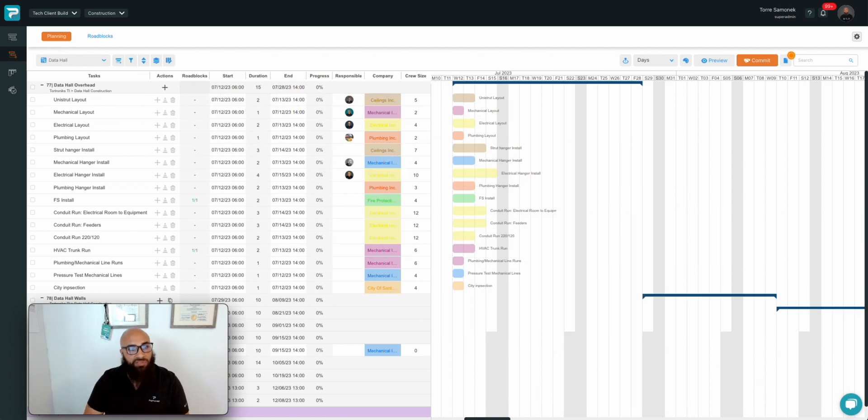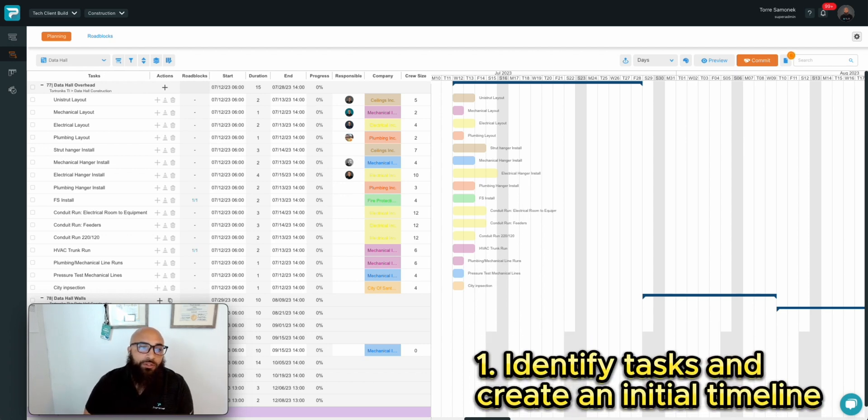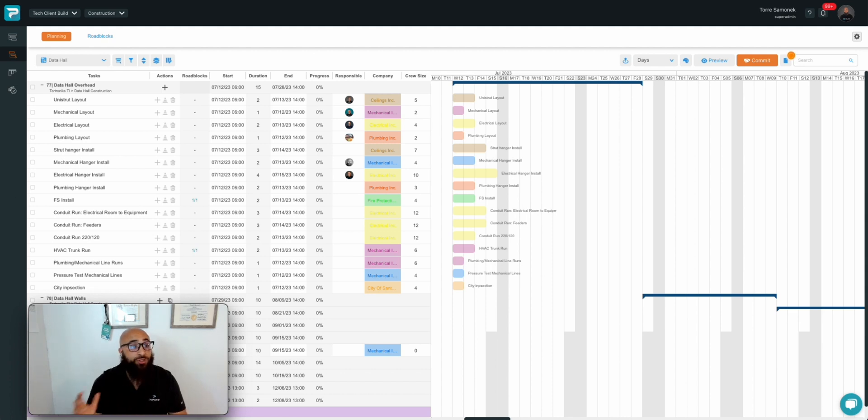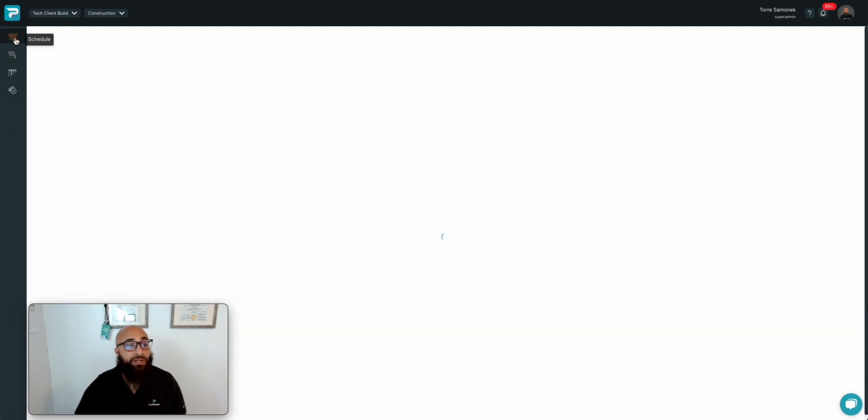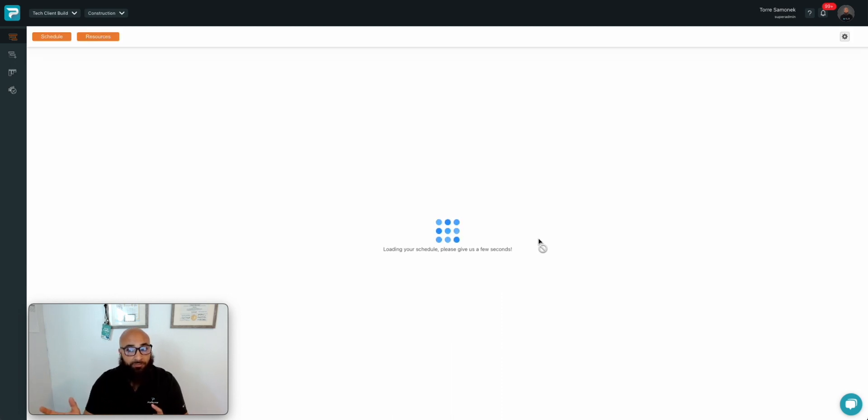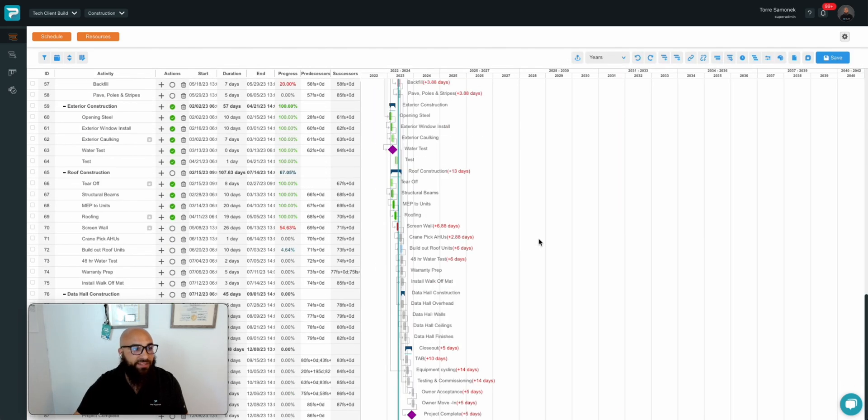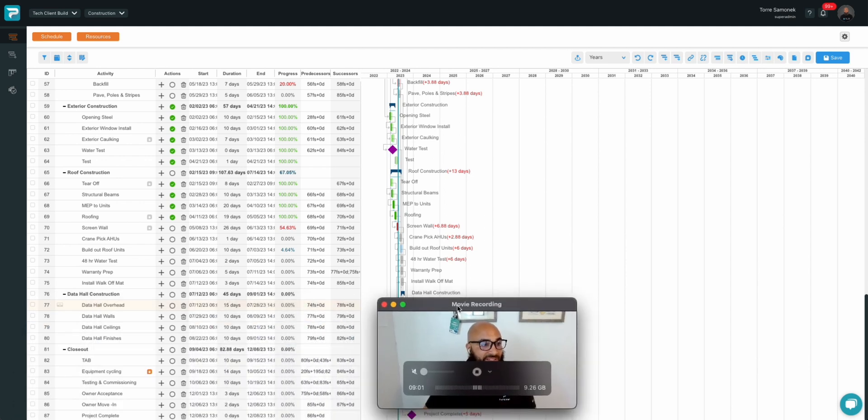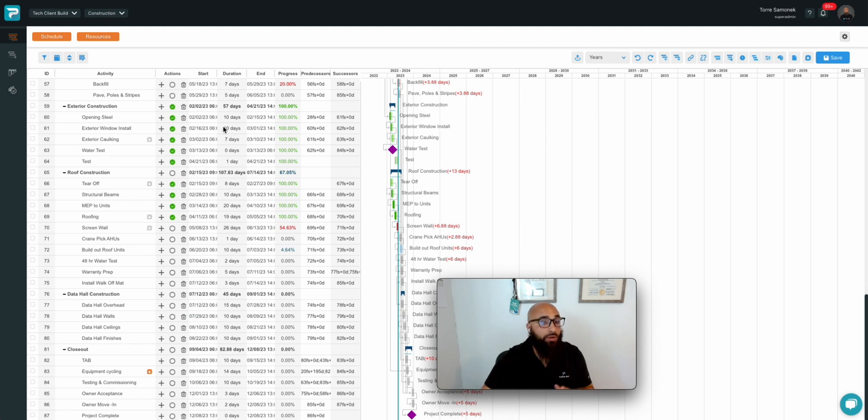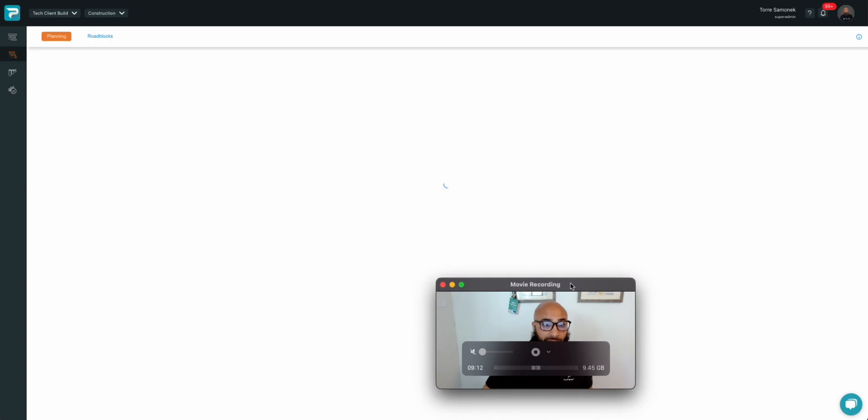Let's start with step one. To start a pull plan, first, it makes sense to come up with an initial timeline and identify the tasks associated with it. In ProPlanner, to start that initial timeline, you'll need to start in the master schedule. At the master schedule level, you can determine logic and flow of the project, but you can also determine durations for each activity. In this case, we're going to be focusing on activity 77, data hall overhead, with the timeline or duration of 15 days. Now, let's jump down to the look ahead and put this plan in action.